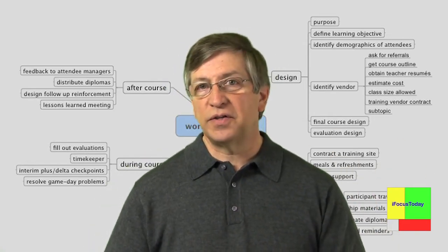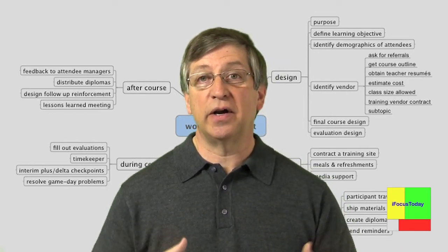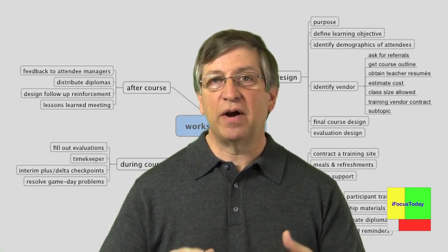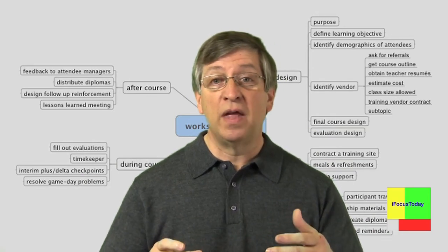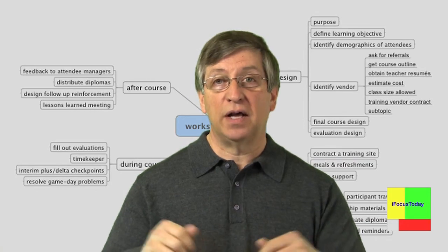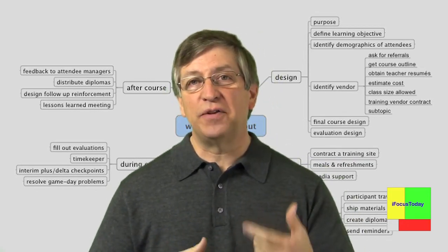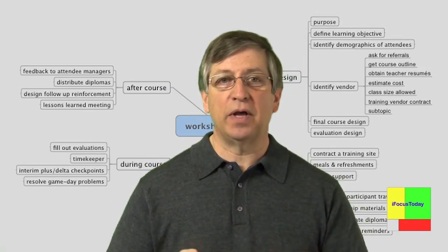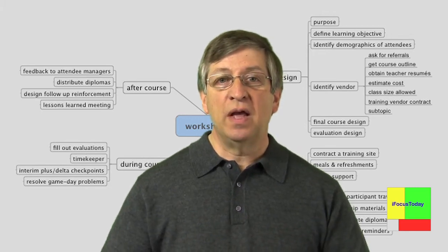What I generally do is have everyone write down 3 to 5 items within their area of expertise or area of responsibility, and then in parallel have them stick them on the wall. And while they're sticking them on the wall, have the team also try to group them, do some work with the tape. After that slows down, have the team go back to their seats and study the map, write down 5 more, and then do some more posting and some more taping.